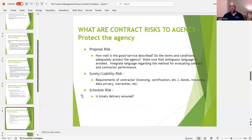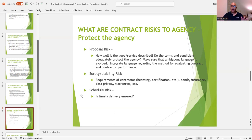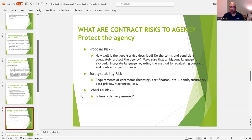What are contract risks to the agency? The agency must be protected. You have proposal risk — how well is the good or service described? Do the terms and conditions adequately protect the agency? You must avoid all ambiguous language — language that is unclear or difficult to target. You have to integrate language regarding the method for evaluating the contract and contractor performance.